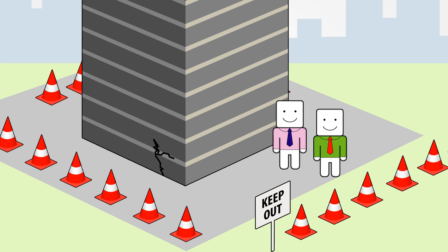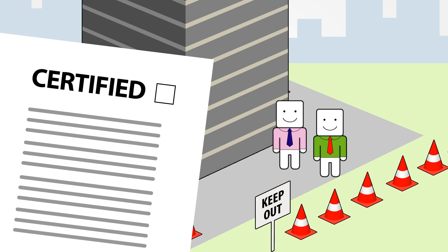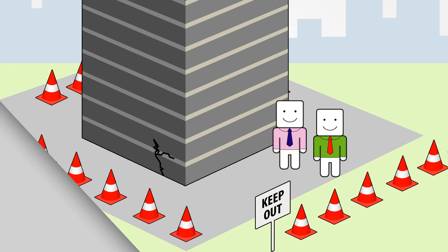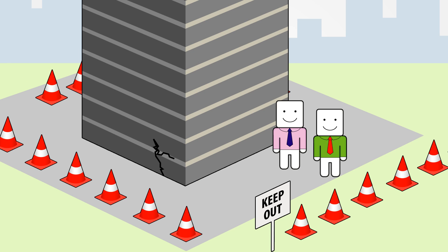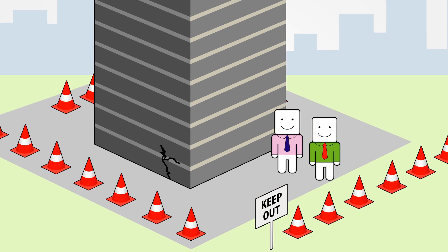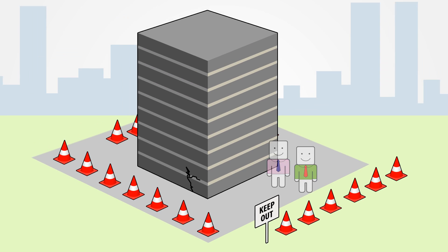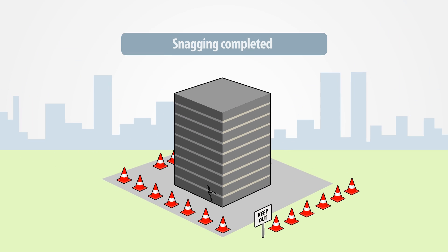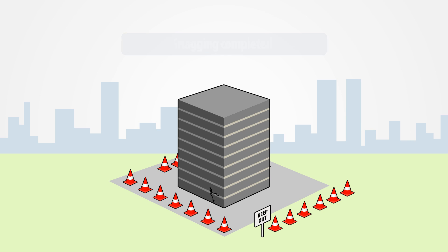Once the building has been certified compliant by authorities, the client engineer will sign the completion certificate. As part of this, any work still required, such as the refurbishment of minor defects, will be scheduled. Snagging will subsequently take place to ensure such minor defects are addressed and the project reaches completion.